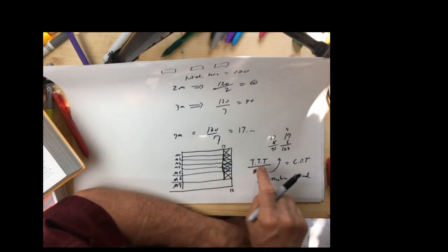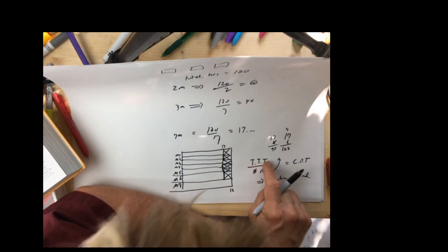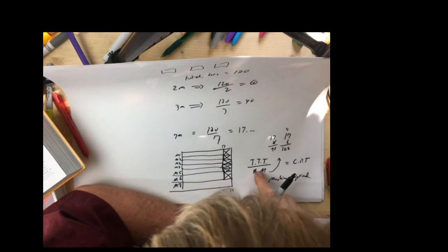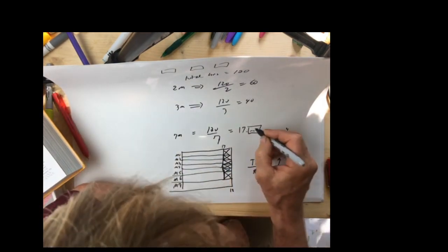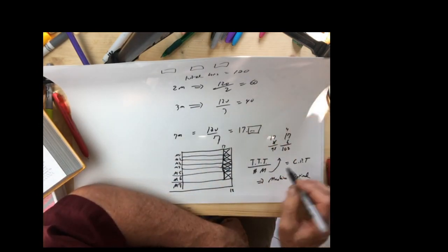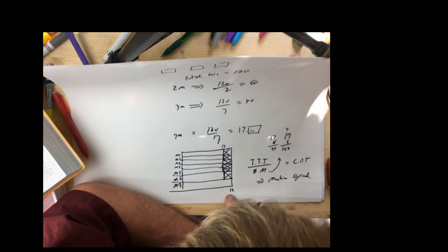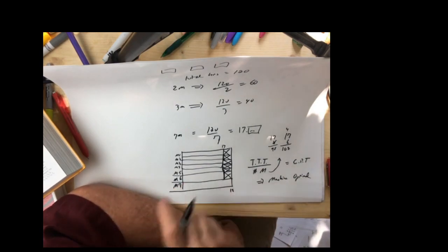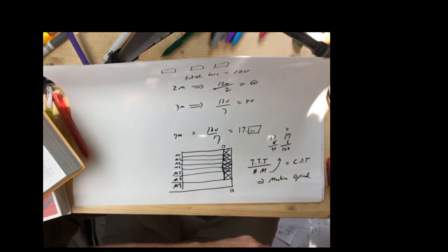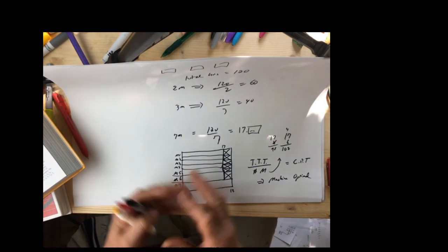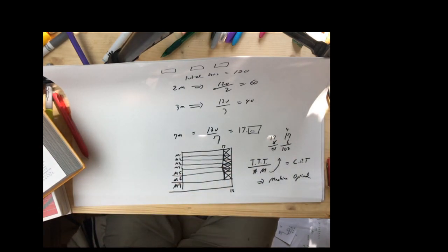You can't do better with that number of machines. And so here, total task times, 120, divided by 7 machines was 17 point something. No matter what the number is, if it's a decimal, round up to 18. Did our schedule finish in 18? Then we would say this is a machine optimal schedule. Locally optimal. All right, that's now 2/3 of the way through Chapter 3.